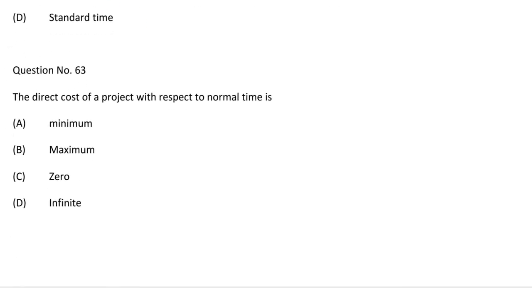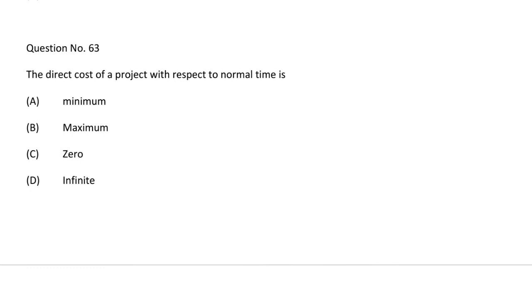Next question: the direct cost of the project with respect to the normal time is — option A minimum, option B maximum, option C zero, option D infinite. The correct answer is option A, minimum.